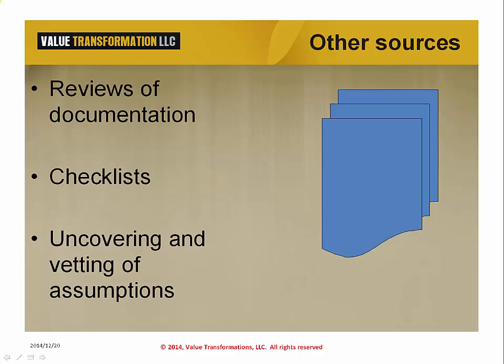We uncover risk when we review our documentation or our intention with the project and our intended way of working. Analyzing any company or department checklist can also help uncover risks. We do not want unvoiced assumptions. Unvoiced assumptions are not vettable. Assumptions are not always valid. Vocalizing assumptions makes it possible to substantiate or refute the assumption. We really do not want to be surprised by something we thought worked one way, but in fact does not.